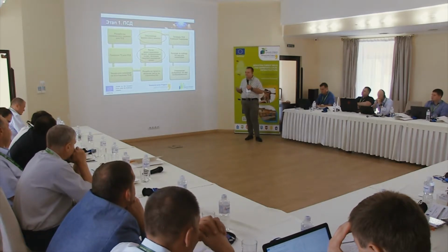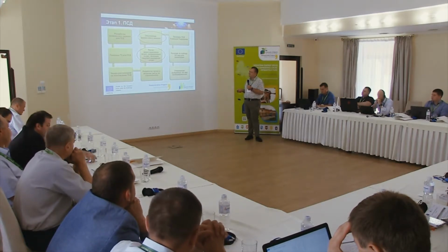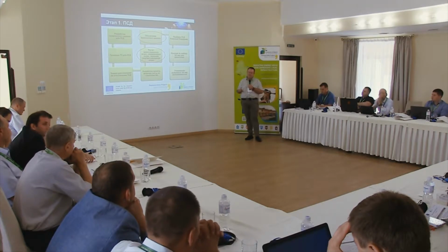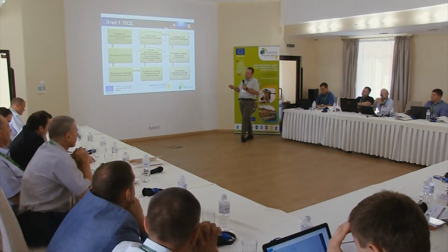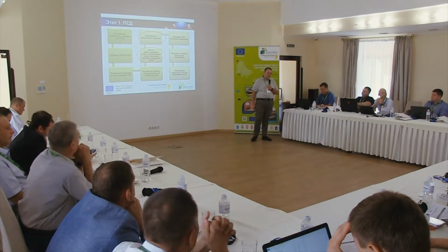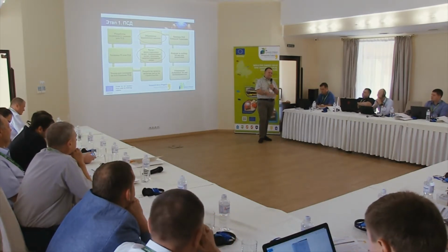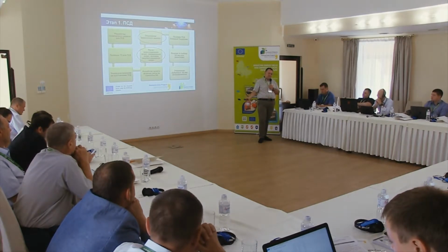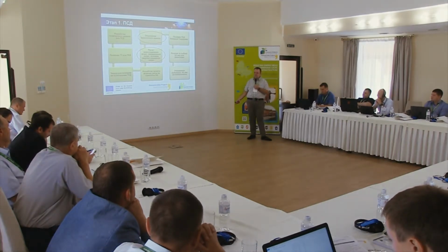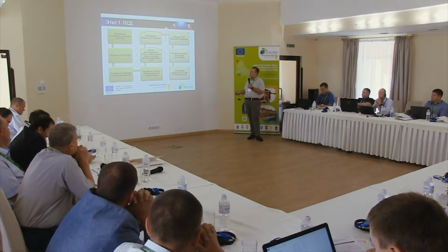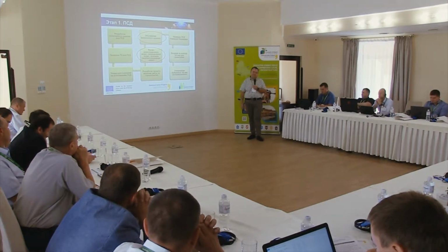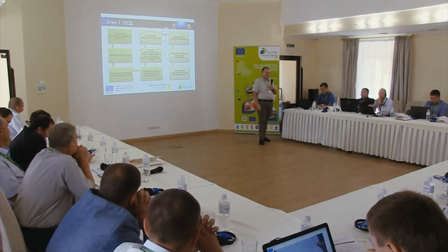The specificity of our projects and our requirements is that at the stage of design specifications and estimates, we want to have updated financial analysis. So that means calculation of all the measures planned at the application stage and the updated cost on the basis of evaluated estimates.